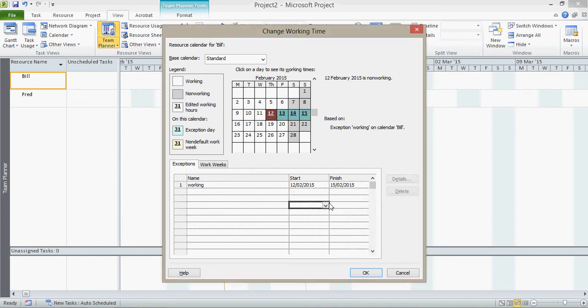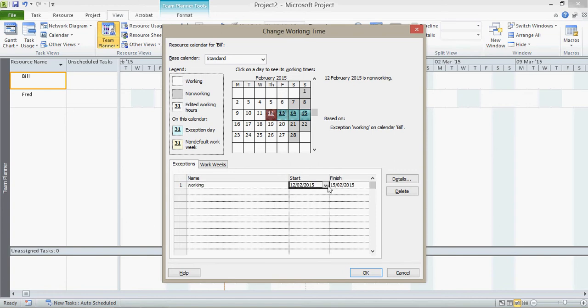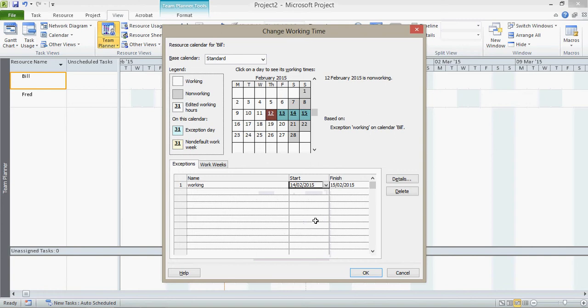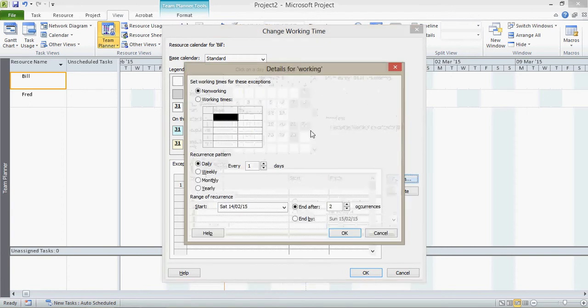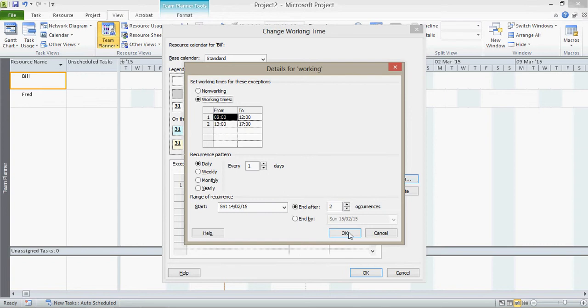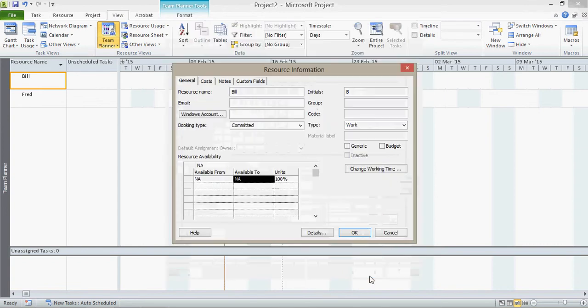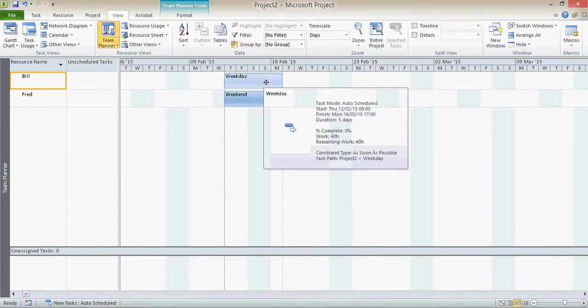Now again, it's gone in as exceptions, but if I click on one of these days, they're still showing as non-working. I'd better actually just change that because this is not the 12th, this is supposed to be the 14th. Yep, so it's only those two which are the exception. But you can see they're still down as non-working even though they're an exception. I need to set the details and set them as working times. Click OK. OK again. That task there has now shrunk down.